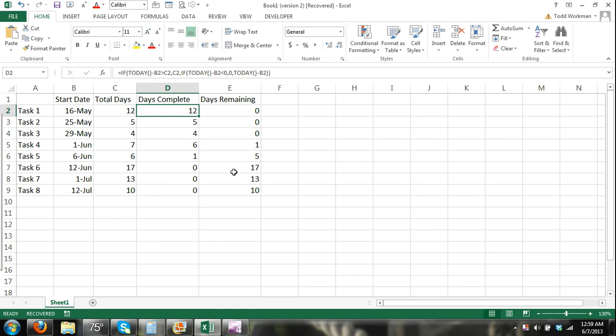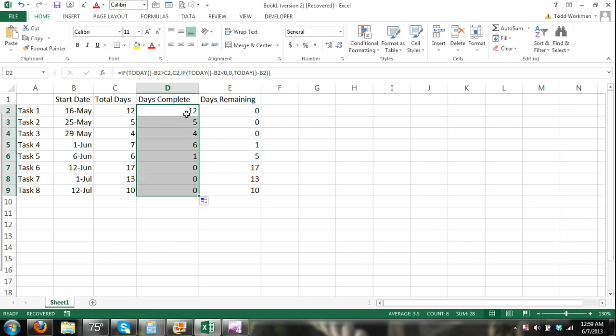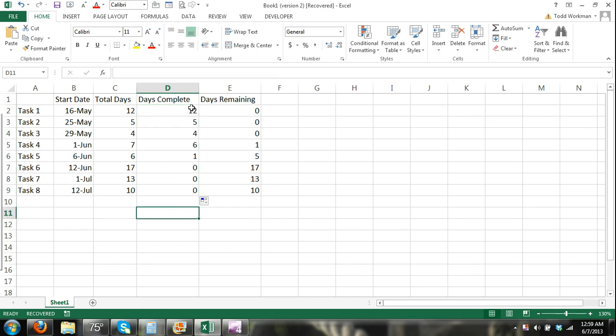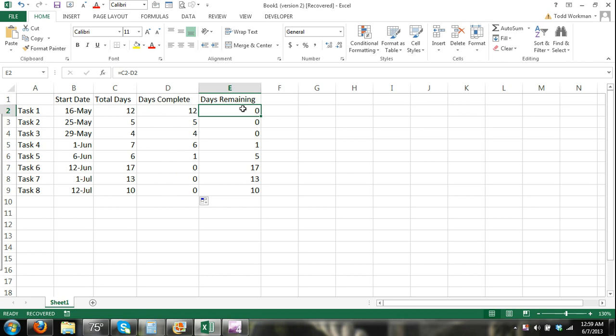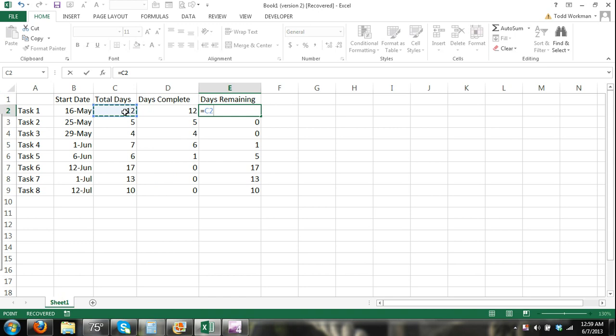That takes care of our days completed. This should always be automated because of that formula. This will always be up to date as the days change. For days remaining I entered a formula which is simple: the days remaining is going to be the total number of days minus the days complete.